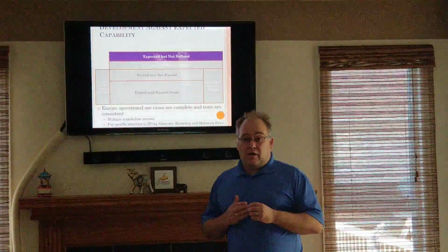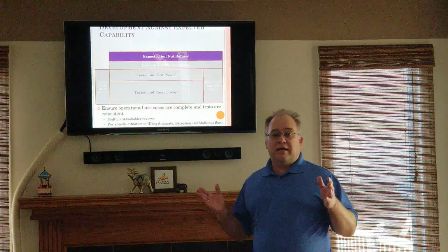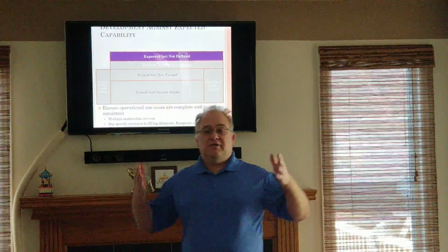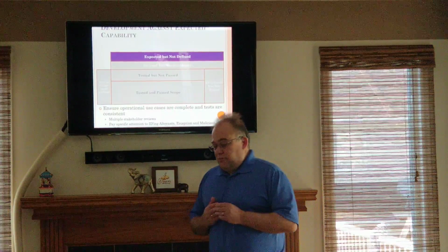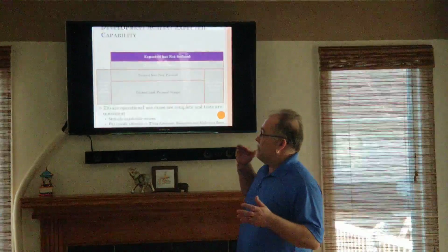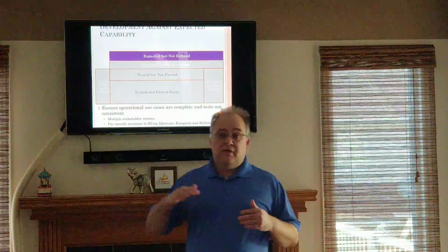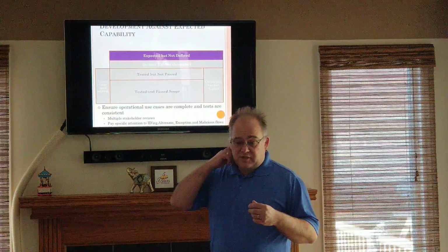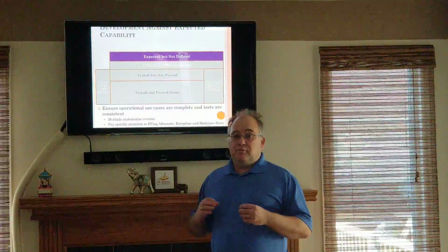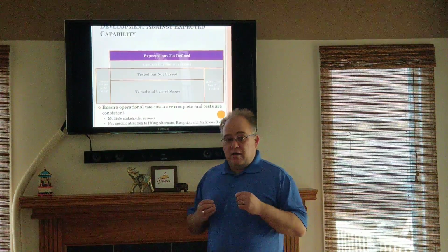Inspected but not defined. This one is very common because the customer comes in and they're not actually technically astute. That's why the rest of us have been hired, to actually address the technical needs. The problem is they come in and they don't actually know what to ask for. This is where operational use cases are critical. And this is a step which is often skipped over in the systems engineering process by many programs, including very large programs. So things like the Phoenix program here in Canada.